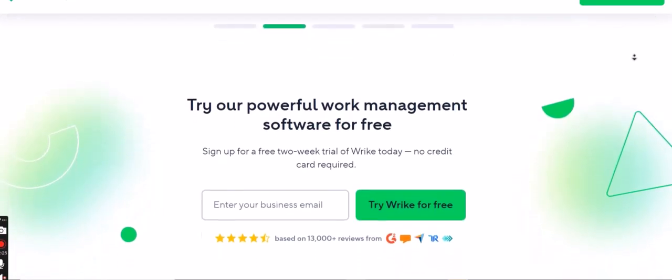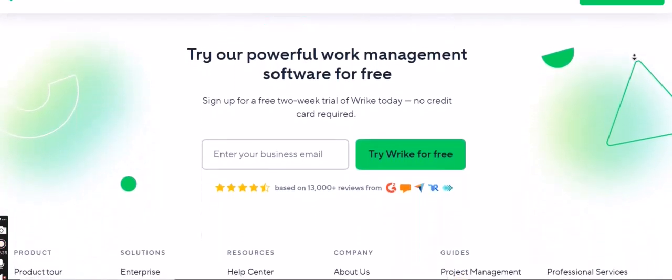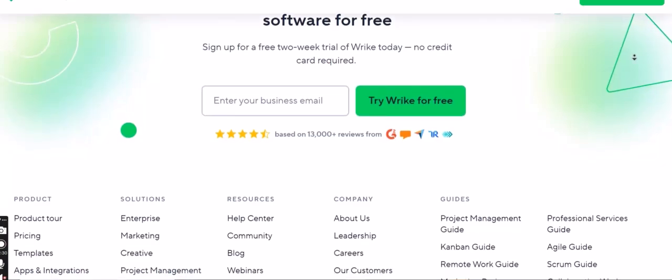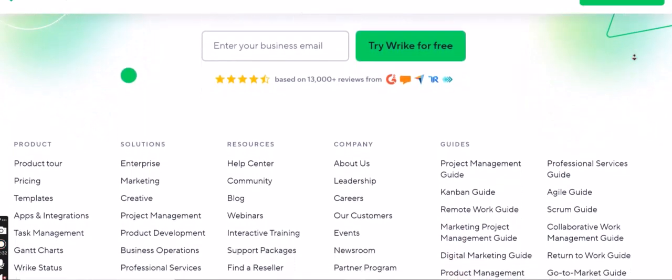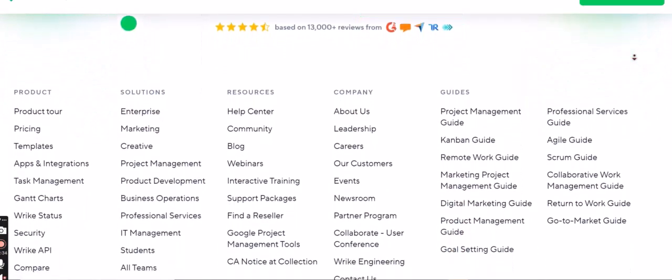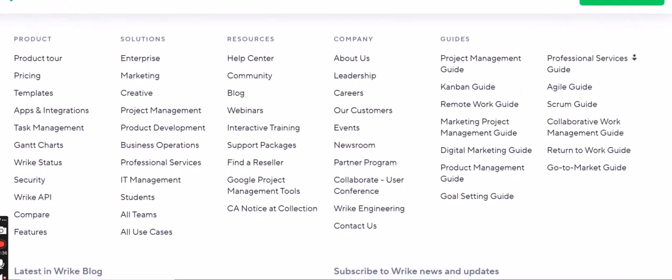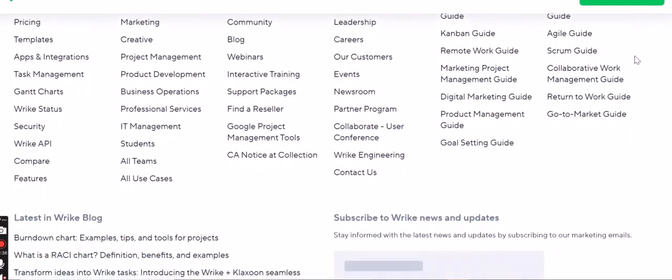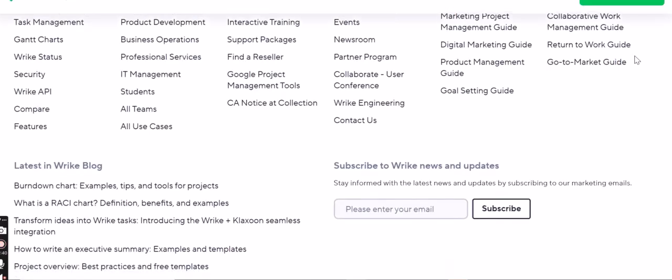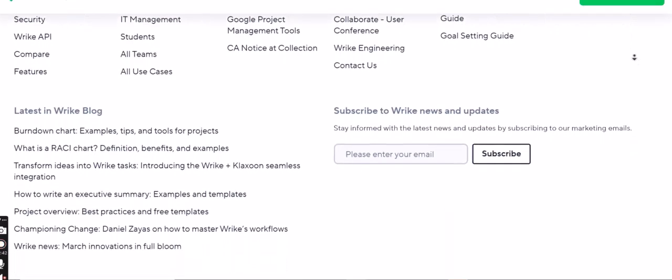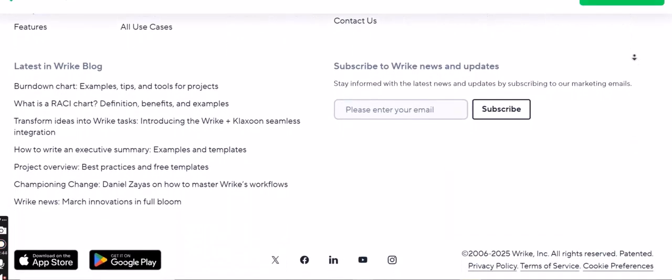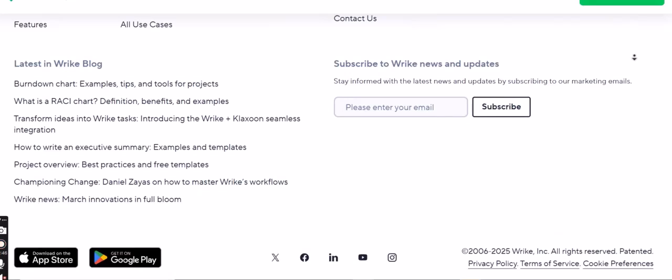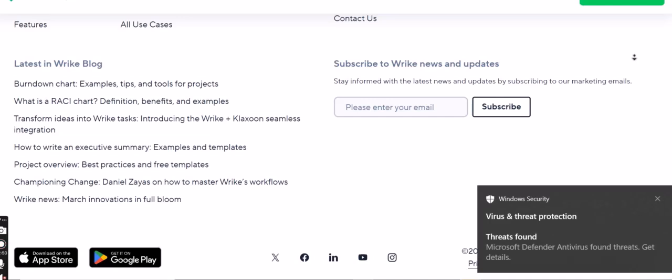Navigate to your project. As in Method 1, locate the project you want to share. Access the sharing settings. Click the Share button in the top right corner. Invite external users. In the Share with Others dialog box, enter the email addresses of the external individuals you want to invite. Wrike will recognize that these are not existing users and will prompt you to invite them as external collaborators. Define access permissions. Limited.